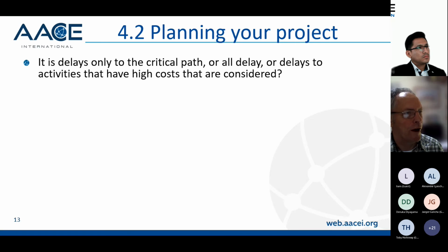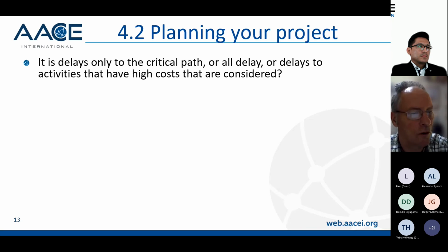And I thought it was grossly unfair that the contractor should incur standby for these enormously expensive cranes without being able to claim an extension of time because they weren't on the critical path. So when you're negotiating your contract, if you've got activities that are high cost, then you should be able to claim delays to them, even if they're not on the critical path.